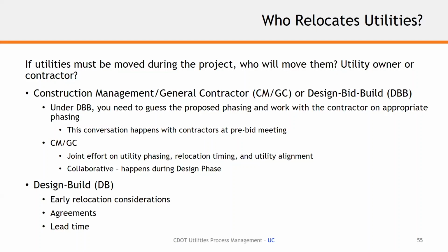And again, that's just some of the advantages of maybe having early relocations and design build, but only to allow these long lead time relocations. I'm talking like transmission lines, big overhead lines that take years to coordinate and relocate.